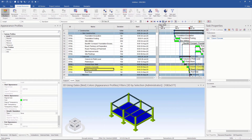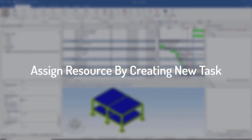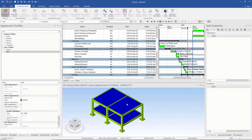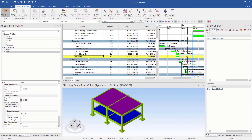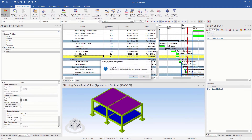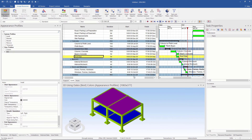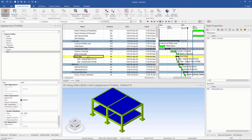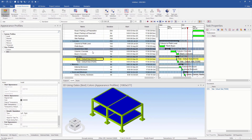We will see a new way of assigning tasks where child tasks will be automatically added for the selected resources. I click resources one by one — the order of selection dictates the order of task creation. I select the task below which new child tasks will be added, then select Create Task from the Assign Resource tab and choose Under Selected Task. The newly created tasks will automatically have links between them. We still have to add a link with the old tasks. The old redundant linkages are removed first, then I add links with the predecessor task and the successor task.